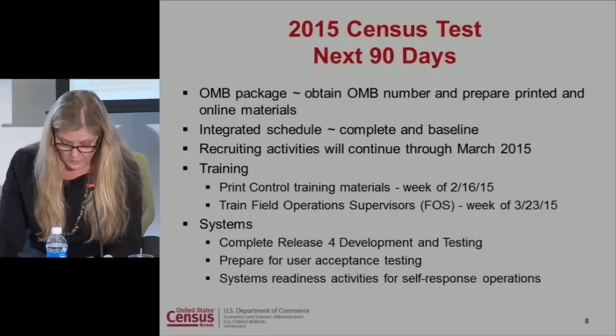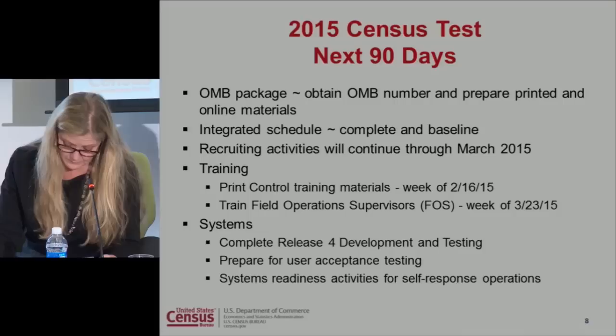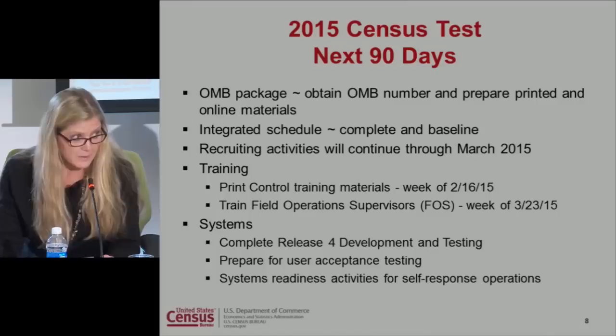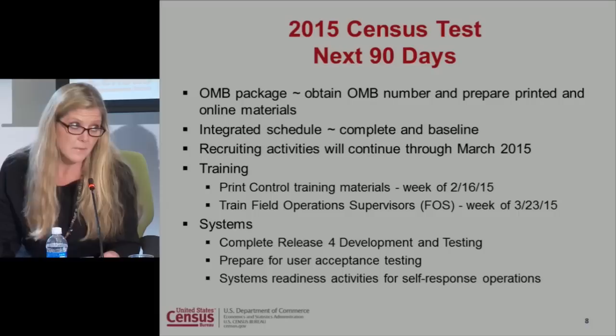And with our training, we will print our control training materials the week of February 16th, and train field operations supervisors the week of March 23rd. And for our systems, we're going to complete the release 4 development and testing activities, prepare for our user acceptance testing, and we will go through our systems readiness activities for self-response operations.